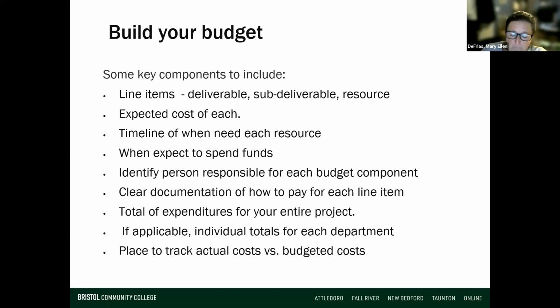So we said that it was going to be $5,000 for canvases this year. We're projecting that I need to spend about $350 a month for canvases, but they went on sale at Michael's and I bought a whole bunch of them. So I spent $600 in 1 month, but I've got enough to get me through 3 months. So my actual cost for that month will be higher, but I'm still within my budget.